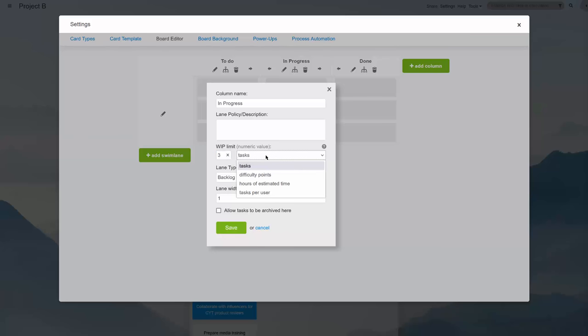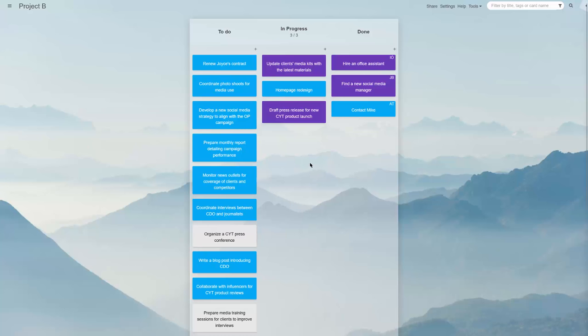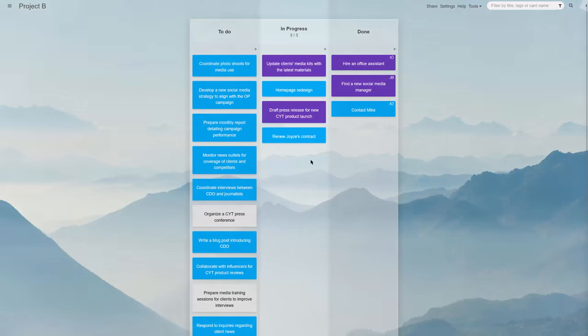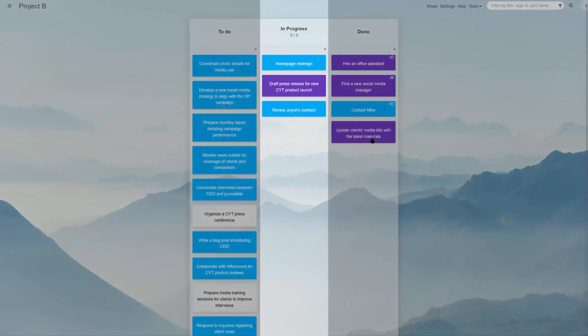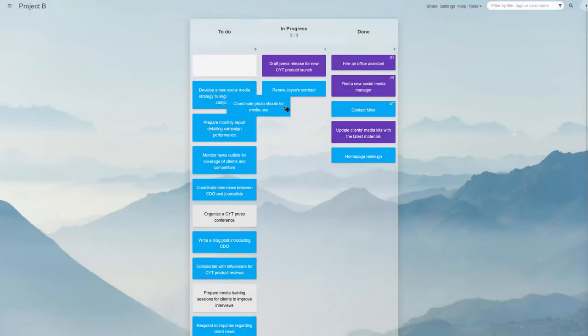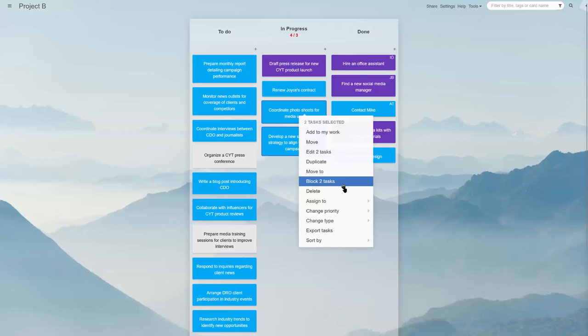Kanban Tool boards let you set a WIP limit like this, guided by task numbers, work assignments per user, difficulty points, or the item's estimated working time. We'd argue that this is all you need to manage a basic team workflow efficiently and transparently.